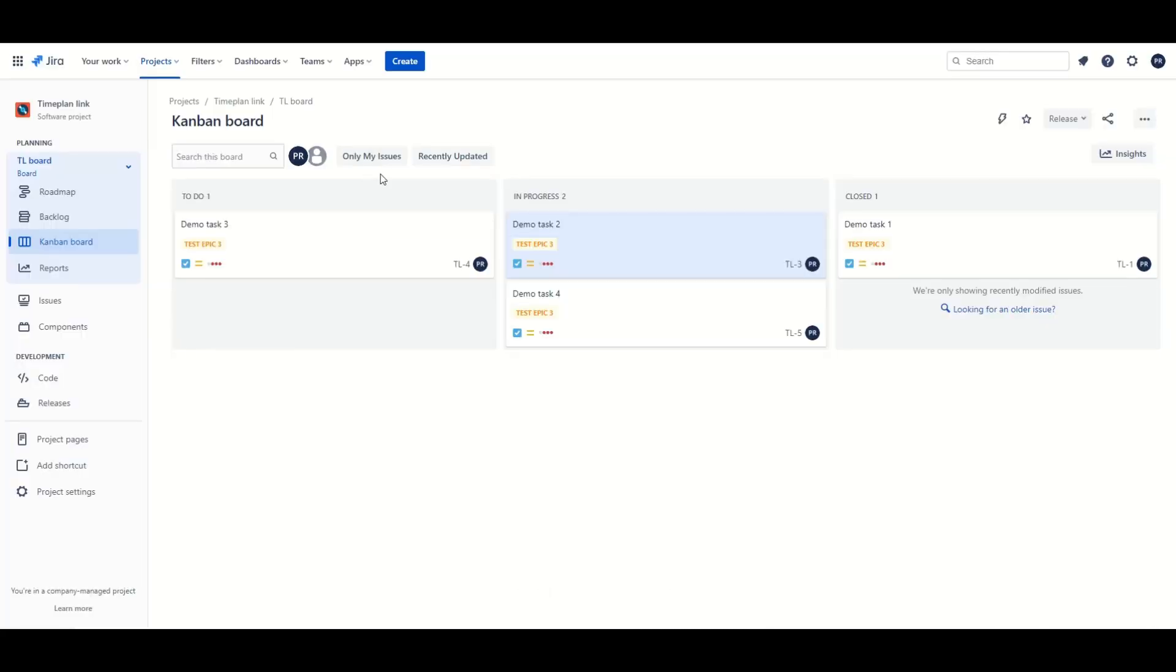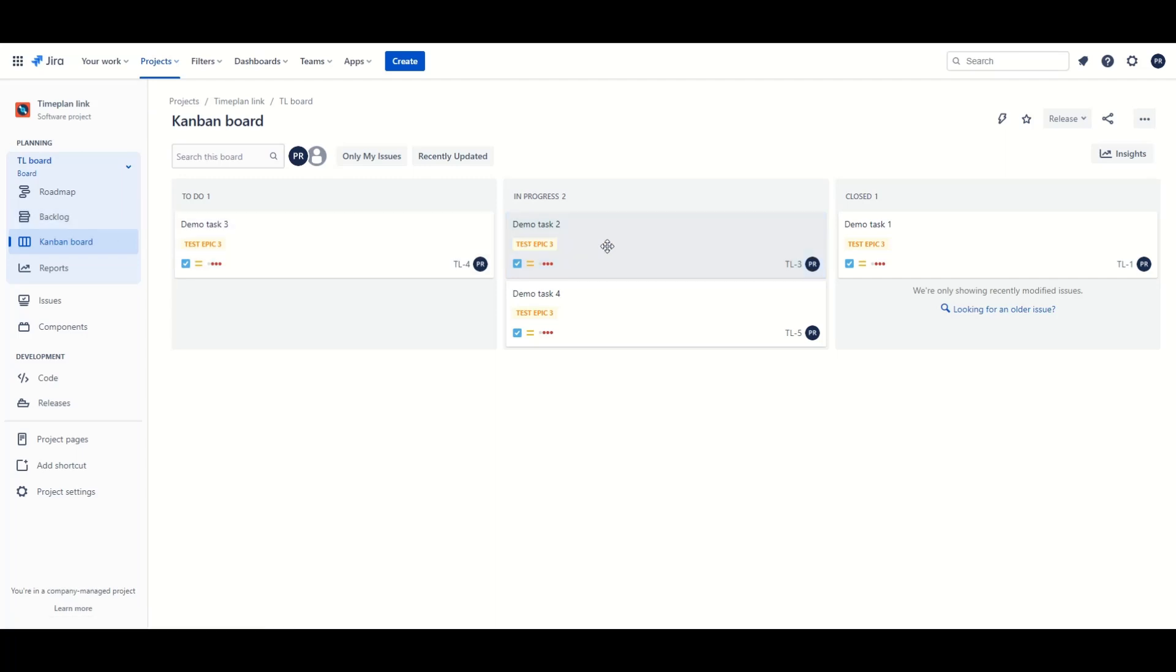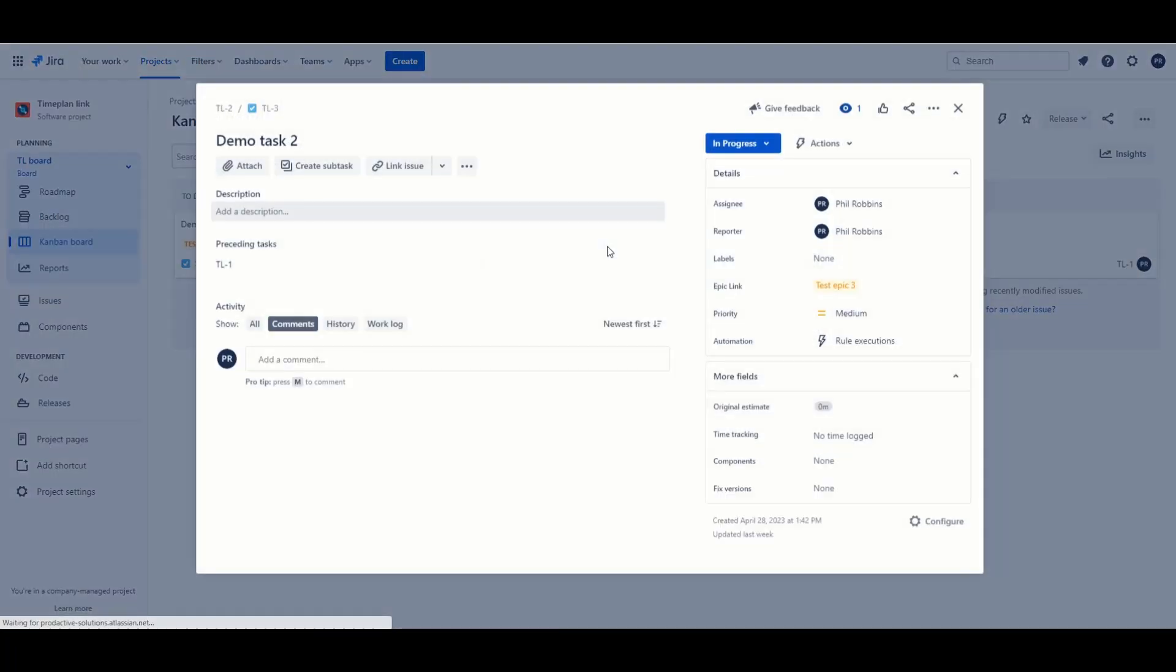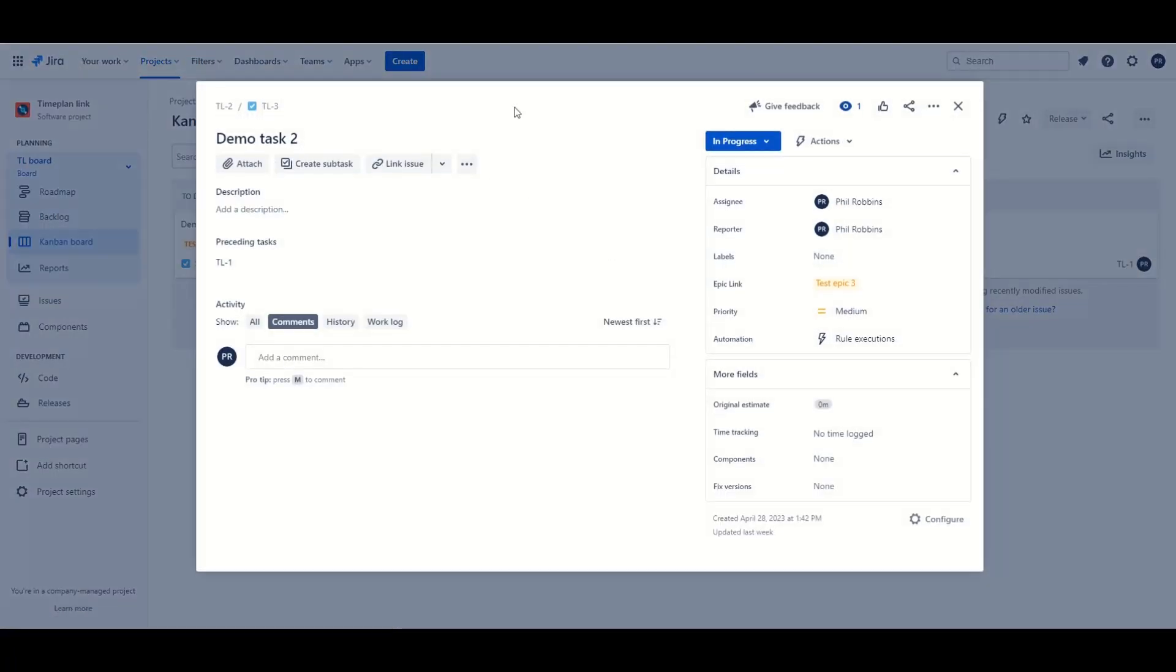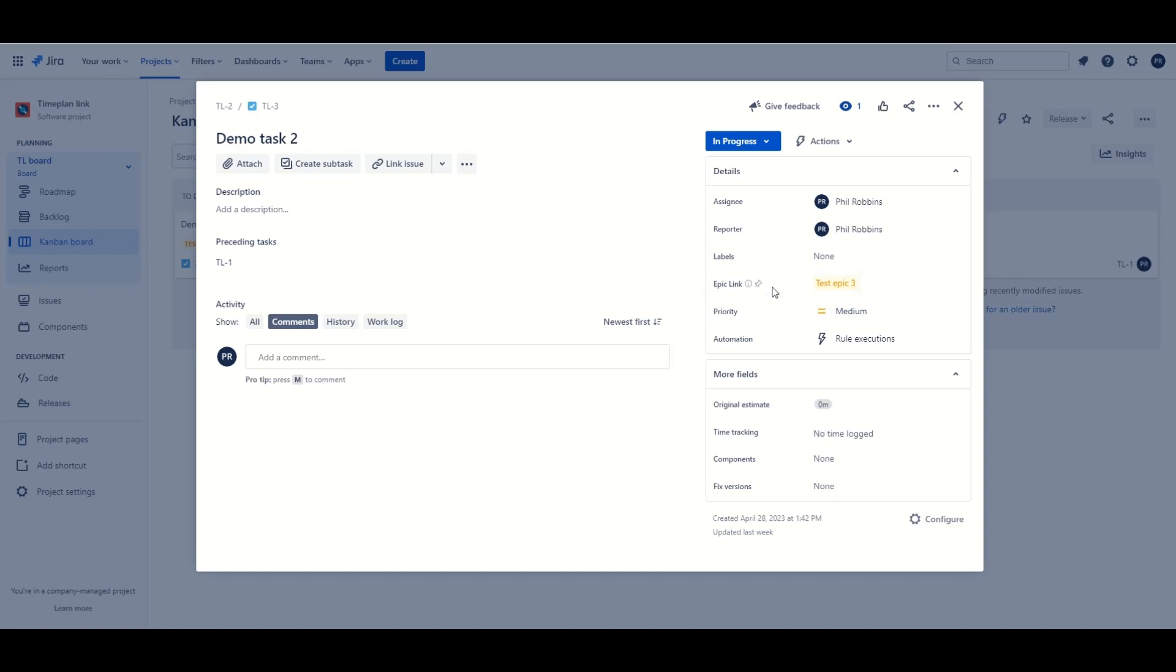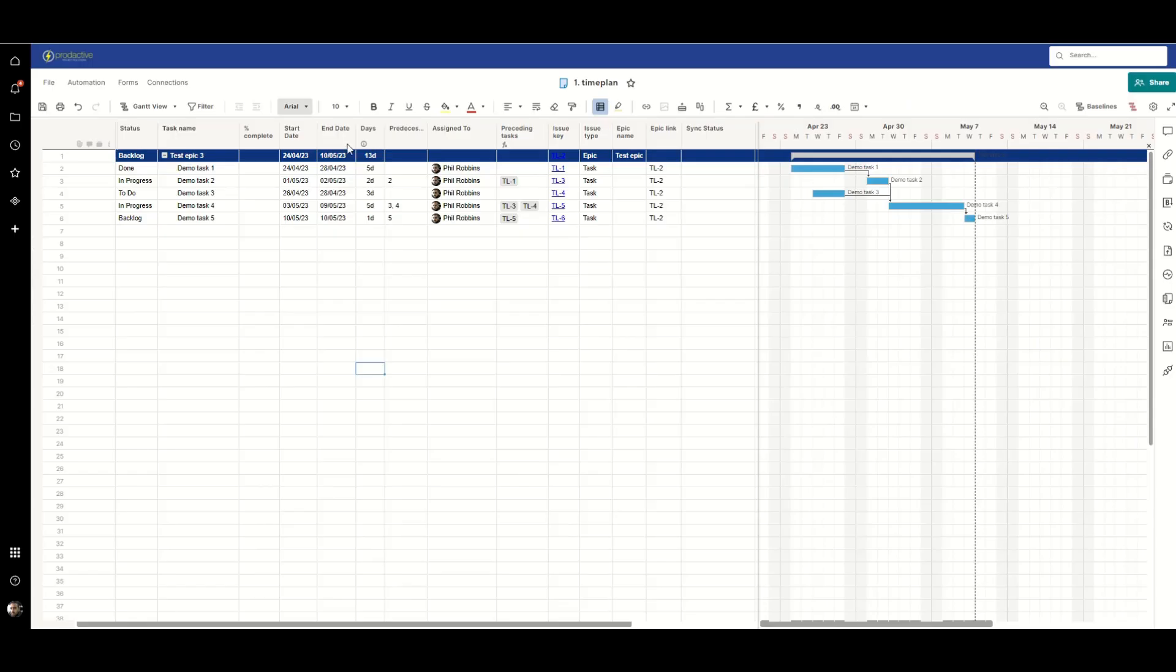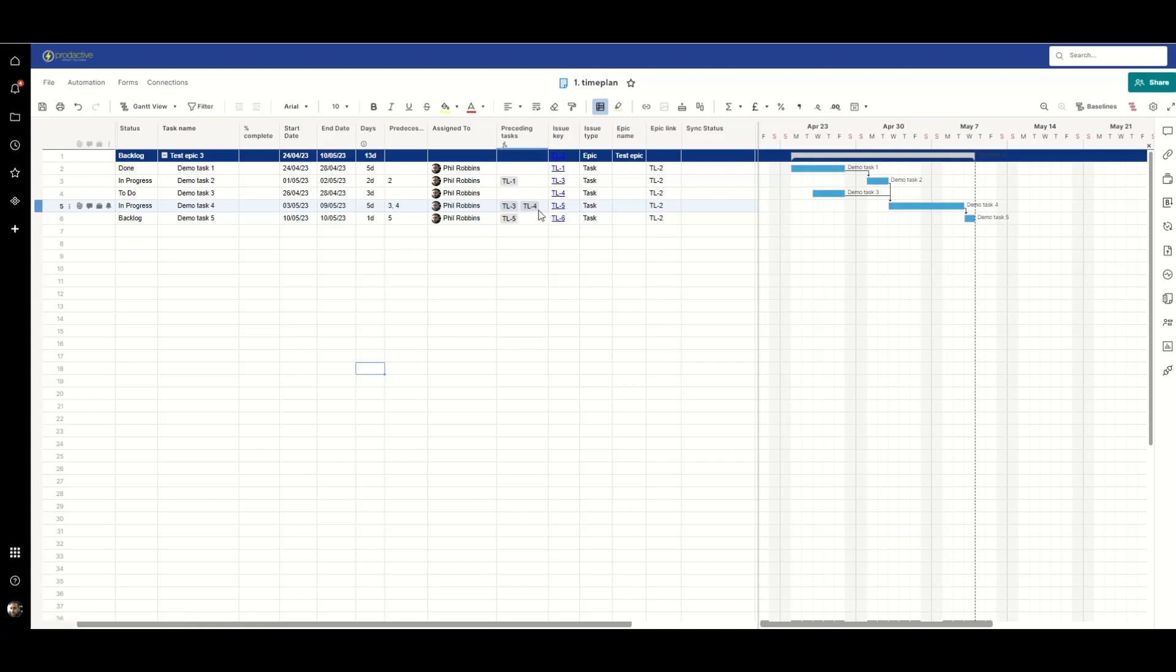Over in Jira I have a Kanban project that I've created with a fairly standard set of columns. I've enabled the backlog and when you go into the view for each issue, again the sort of standard fields that we have available that you'd expect to see. We've got the epic link which is the kind of a hierarchy within Jira and we have this preceding task field which is a custom one I've put in there that effectively leverages the predecessor function in Smartsheet to identify the issue keys of preceding tasks.